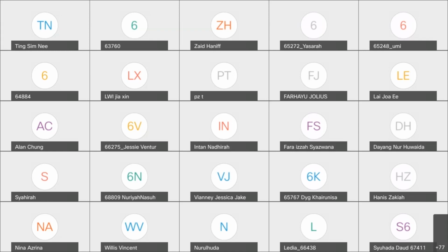So when you calculate the production rate, it is the rate for the entire team, not just one guy. It's a matter of how these 3+1 people work, and they will be looked at as one individual, not 4 individuals anymore. Then the cost will be the combination of these.